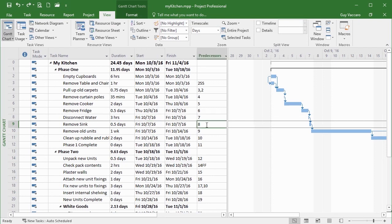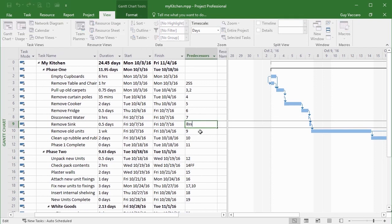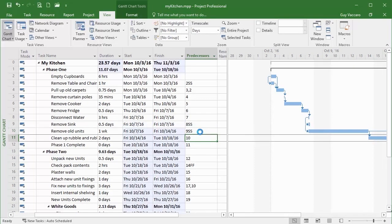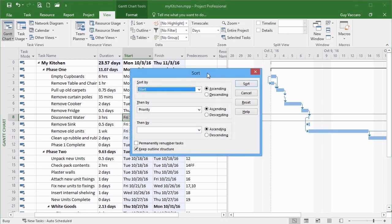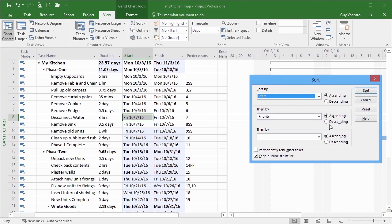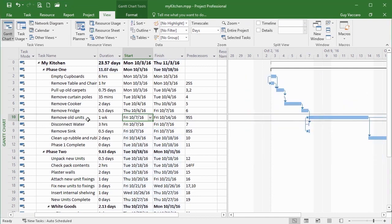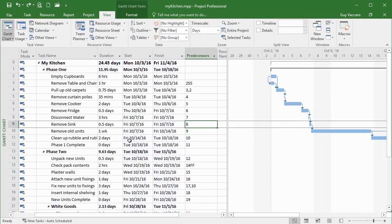The way we can trick it for the purposes we want is to put these as start-to-start links — place our SS links in there — and then effectively all three of those do start at the same time. So when we go to Sort By start then by priority, with descending priority so the highest is at the top, 'Remove Old Sinks' should move to the top — and in fact it does. We had to trick it by changing to start-to-start links so they truly started at the same time. Obviously that won't be necessary in a real situation. Let's undo a couple of times, take those SS links out, and get back to where we were.